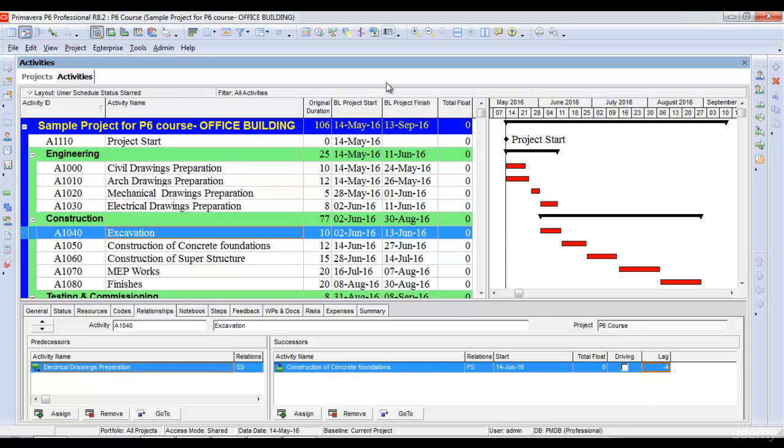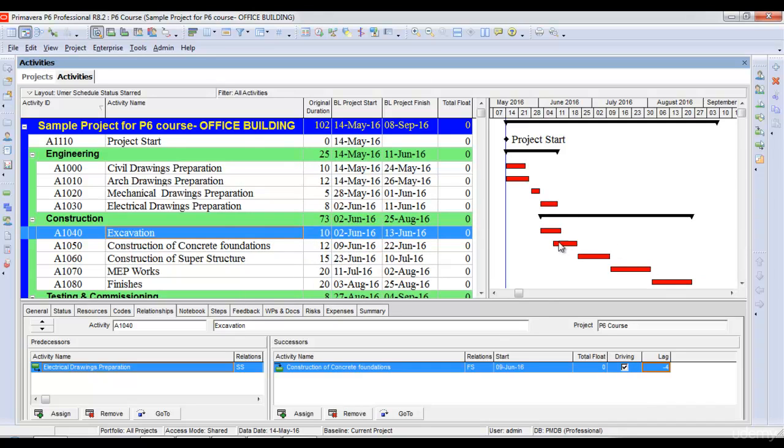Remember to always schedule your project. I've scheduled my project again, and it now shows the overlap between the two activities.